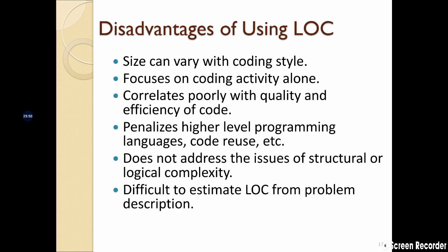Now, the disadvantage of using lines of code is that the size of the code can vary with coding style. If I am a very good developer, I can write a very sophisticated program in very simple ways by writing 5 lines of code. And there is some other person who is not a very good programmer, and to implement the same problem, he's using around 20 lines of code.